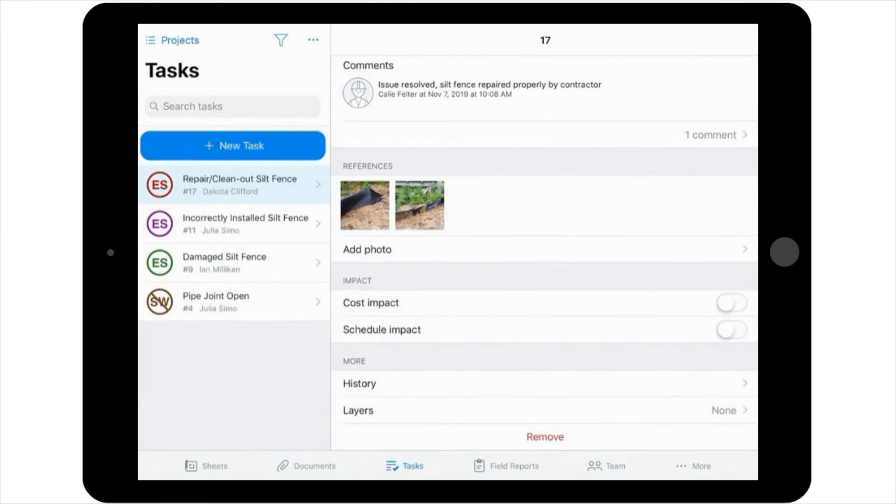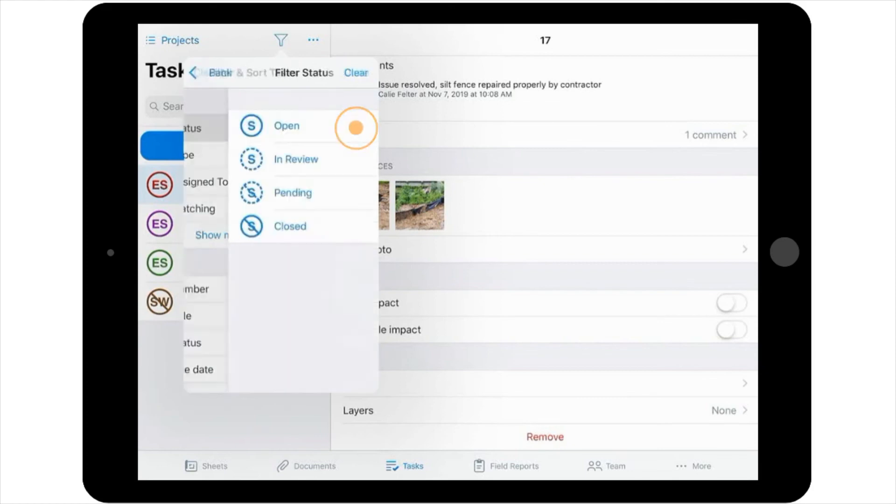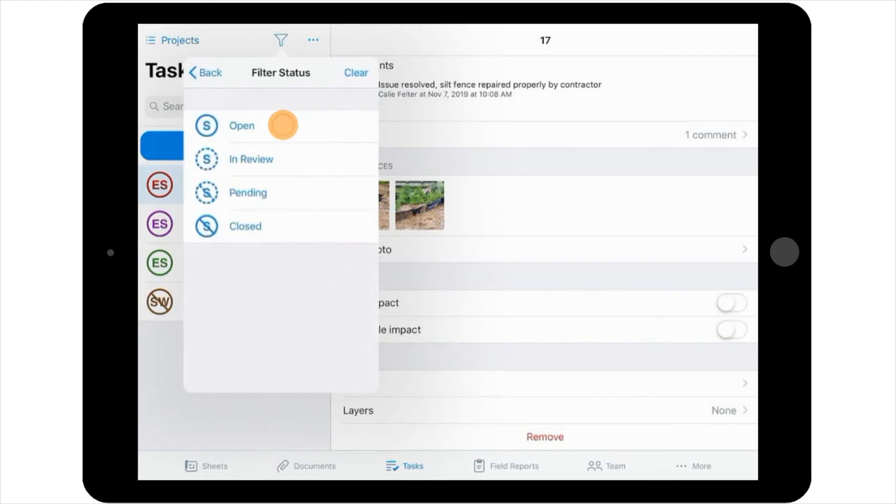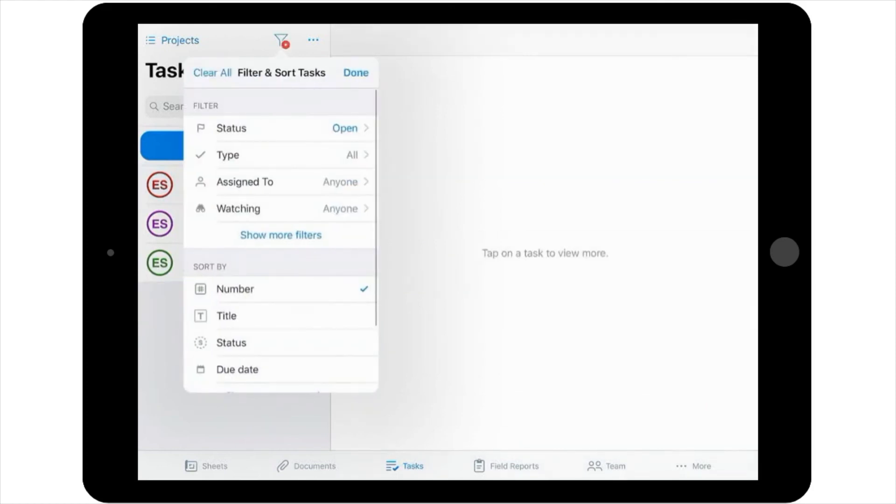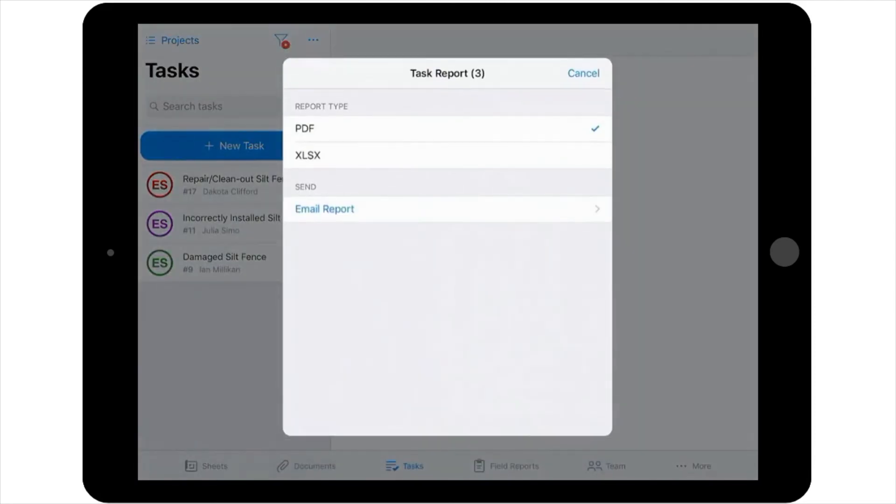Briefly, you can create a task report by first selecting the filter icon in the top right-hand corner of the tasks pane to filter down to the specific task or tasks that you'd like to include in the report. You would then select the More icon in the top right-hand corner of the Tasks pane, select Create Task Report, select PDF or XLSX for the document type, and then Email Report.